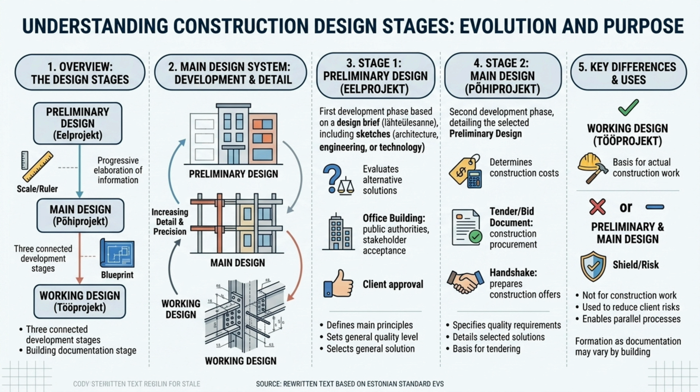The main goal at this point is to evaluate alternative solutions and select a general approach that best suits the client's requirements. This phase also considers input from the public authorities and other stakeholders, ensuring that the proposed solution can be accepted by everyone involved. The chosen solution, along with its core principles and desired quality levels, is documented, and then the phase is concluded when the client approves the preliminary design.